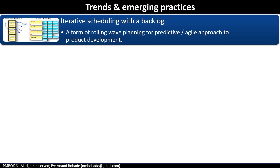Another trend is iterative scheduling with a backlog. We are all aware of the traditional scheduling approach in which first we get detailed requirements and then have a detailed schedule to deliver the agreed scope. But with changing industry dynamics, changing requirements and ever-changing technology landscape, there is a need for speed — customers want to see something working, something referred to as a minimum viable product, MVP. And this is where iterative scheduling helps. Typically, this is done in an adaptive environment — it is a form of rolling wave planning for adaptive, agile, or hybrid approaches to product development.